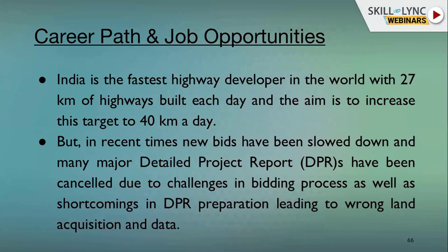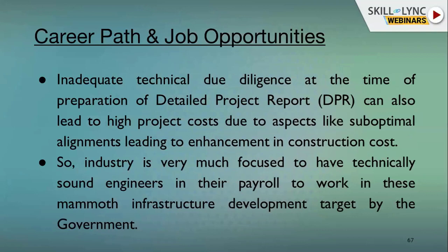But the main drawback is that in recent times new bids have slowed down, as many DPRs have been cancelled due to challenges in the bidding process as well as shortcomings in DPR preparation. If we do not assess the cost properly, if we do not assess the development proposals properly, the cost assessment will be wrong, then the bidding process will be wrong. If we do not assess the land acquisition properly in detailed engineering, then the land acquisition data will also be wrong, so the project will halt. Inadequate technical due diligence at the time of DPR preparation can also lead to cost issues, like suboptimal alignment, leading to an increase in construction cost.